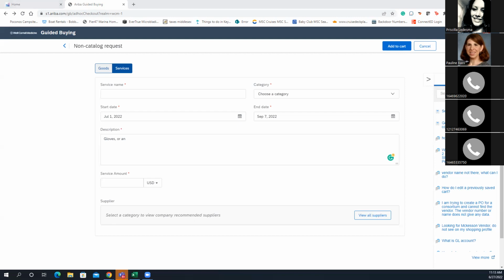Thank you. Do you still have to add in the justification letter? Yes. So this is new: anything over 10,000, and we're trying to lift that limit to 25K due to the federal guidelines changing. We will send out the notification, but yes, that is required for services or materials for non-preferred suppliers.